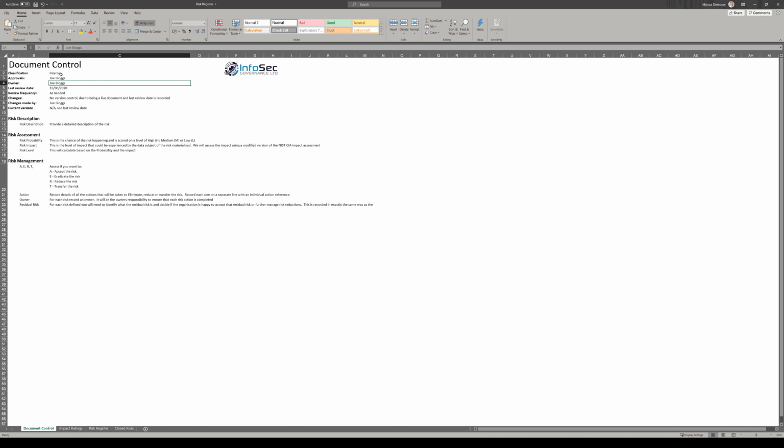Ideally, any documents within the business should have a document owner. Whether or not that's a team of people or just one person, that's for your business itself, but ideally you should have someone there who actually owns and controls the document. Last time it was reviewed. For risk registers, it should be reviewed constantly. It should be a live document. You should be going through, reviewing it, modifying it, reevaluating those risks, adding risks, removing risks, and you get the idea. So if there was said frequency review, we've just put as needed, but that could be a monthly, it could be quarterly. I wouldn't say any more than quarterly because it's going to get stale in that case.